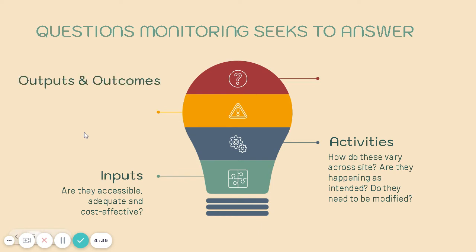Third, we also seek to assess the outputs and the outcomes of these activities. So, outputs are the direct result of the trainings. In this particular example, outputs would be the number of people who have attended the training. And I could check that based on a register, for example, or I could run a survey at the end and count how many surveys I received. Outputs might be something like feedback from whoever has conducted the training. So they would tell me how the training went, and that is considered an output.